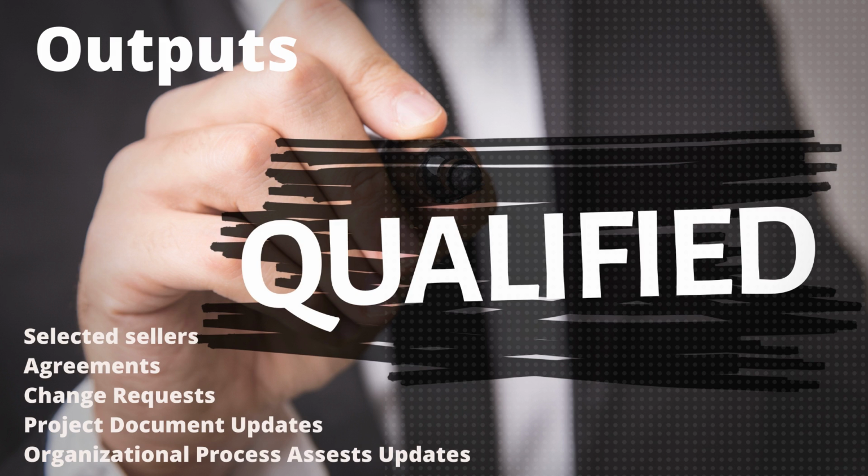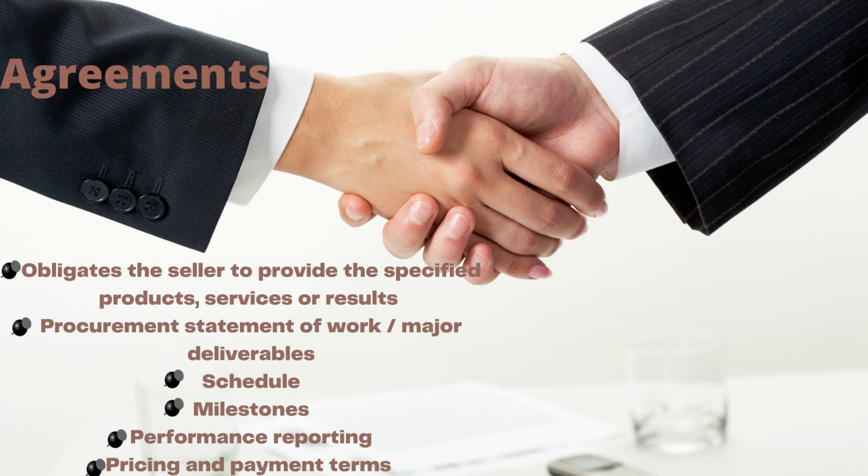For the outputs of conduct procurements, we have selected sellers, agreements, change requests, project document updates, and organizational process assets updates. Particularly, agreements are a contract that is a mutually binding agreement that obligates the seller to provide the specified products, services, or results. It obligates the buyer to compensate the seller and represents a legal relationship that is subject to remedy in the courts.